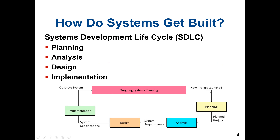When we have a new project, the first phase we go through is planning, and the output of the planning phase will give us the planned project. Then we move on to the analysis phase. In the analysis phase, the system analysts and also the stakeholders of the project come up with the system requirements.